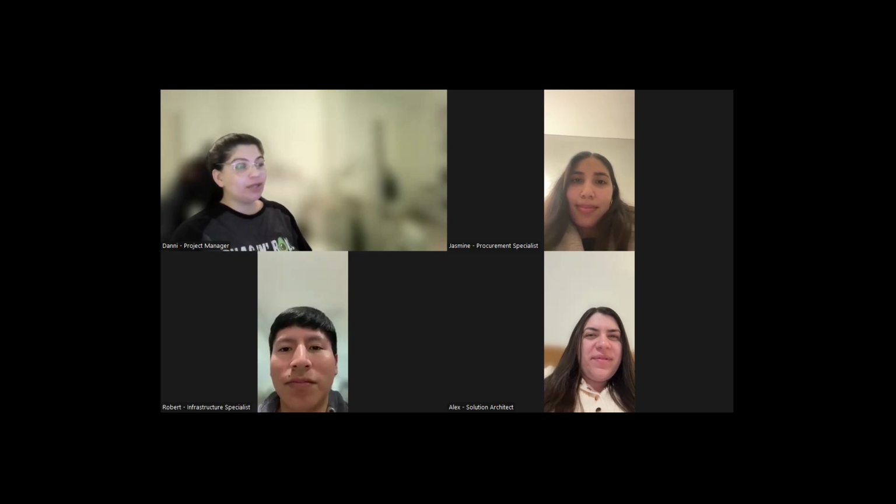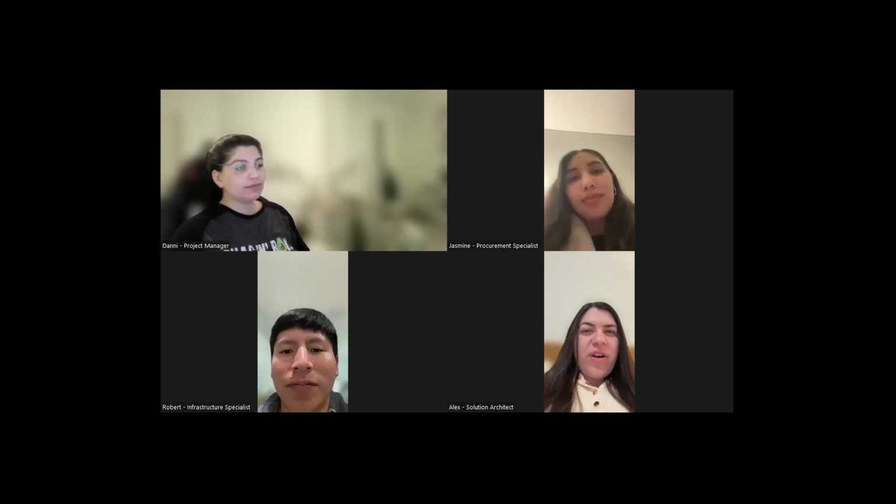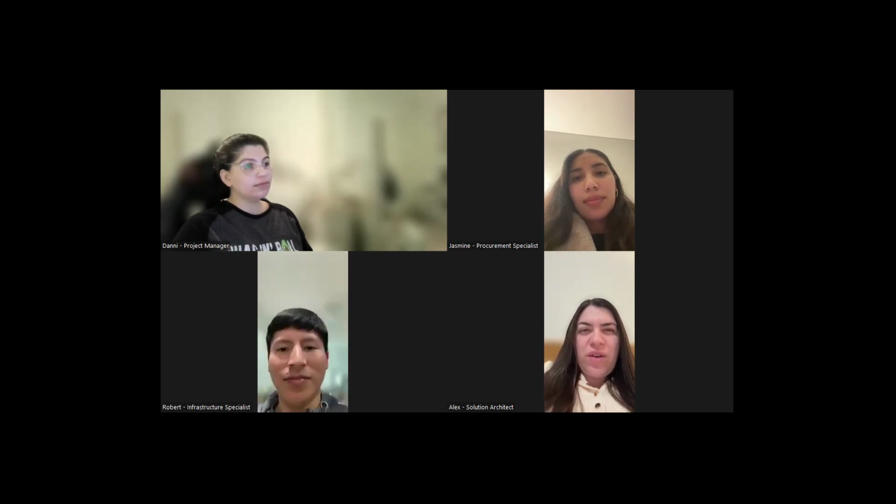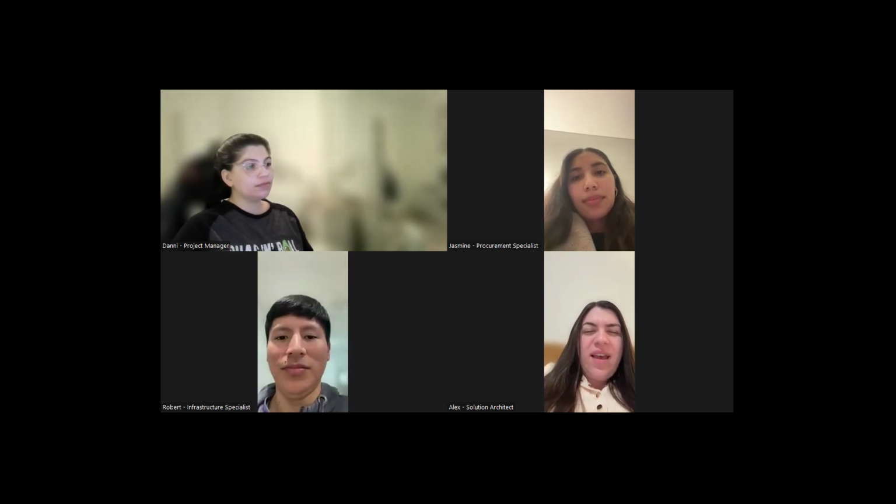We'll need to think about user manuals, admin guides, training sessions, and ongoing support. Alex, any thought on what you'll need here? Yeah, I'll be drafting the system and admin documentation. That'll take about 2 to 3 days of focused work. We'll also need time with the training team to make sure user manuals are clear and tailored. And I'll want to run a walkthrough session with the help desk so they know the system before we go live.